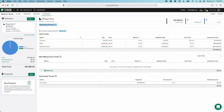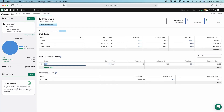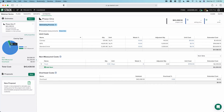Right down here is a non-measured section — this is a very Excel-like experience. This is where you can add in anything you're not going to physically measure on a plan page, typically like equipment, permits, or freight. My example is a truck — we're going to need a truck for three days at $750 a day, and you can see our little pie chart updates in real time. I'm going to go ahead and add my overhead at 12% — the cost of doing business that I want to pass on to my customers. And we can see that we have arrived at a project cost: for me to build these structures, it's going to cost me $48,651.12.